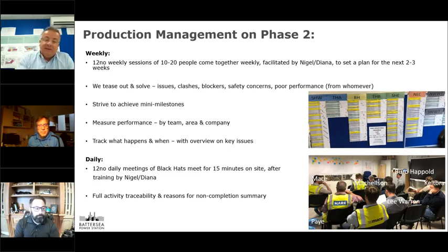And then we take that down to a daily basis where we meet with the black hats, we call them, which are the supervisors out on site. A 15-minute stand-up meeting where we plan at 4 o'clock today what we're going to do tomorrow, and then at 4 o'clock tomorrow we come back and say, did we get it done or didn't we get it done? And we capture the reasons why things don't get done, because that's really valuable and rich learning for us. So it gives us that traceability. Next, please, Fernando.